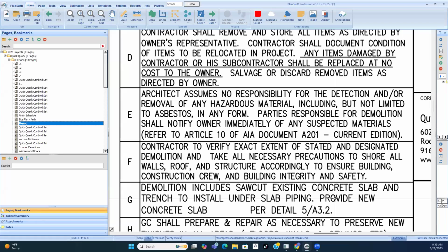If you get any contract from any GC for commercial, they all use that same thing. It's not like every GC has their own contract. That's the purpose of AIA documents, and you can actually buy a subscription to that. So these GCs have a subscription to these documents, they pull them out and use them based on the type of project they're working on. So that's good for you to know.